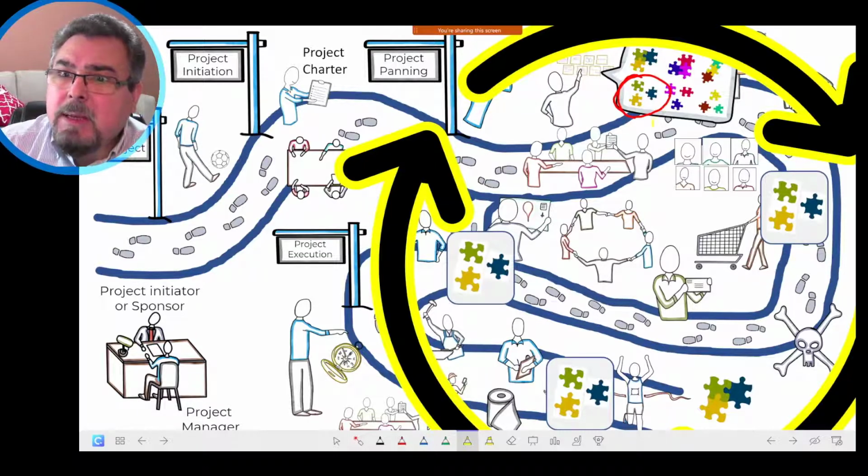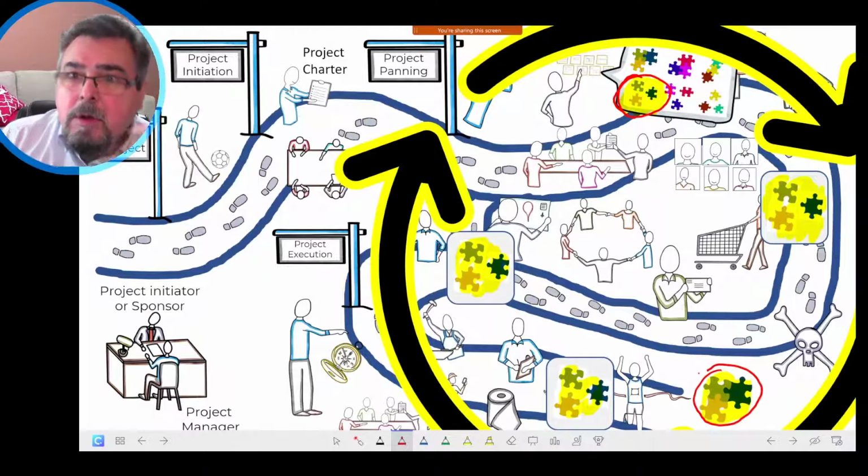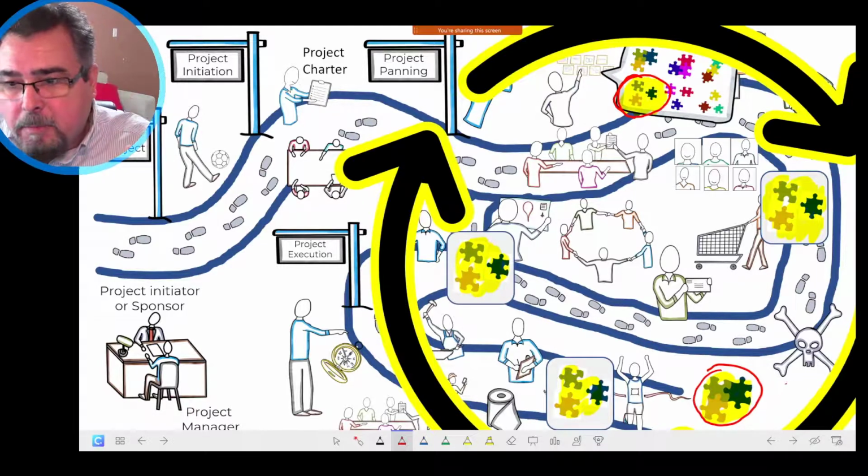Can you see that I'm taking that green, blue, and brown, something like that? And I'll be doing the planning, scheduling, human resource, procurement, just for those pieces. I complete the planning for these pieces. Then I execute just those 3 pieces, and I deliver those 3 pieces. That's the first cycle. From here, the client may be happy with the product or unhappy, okay?